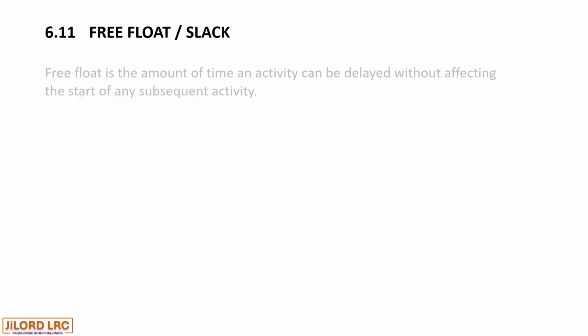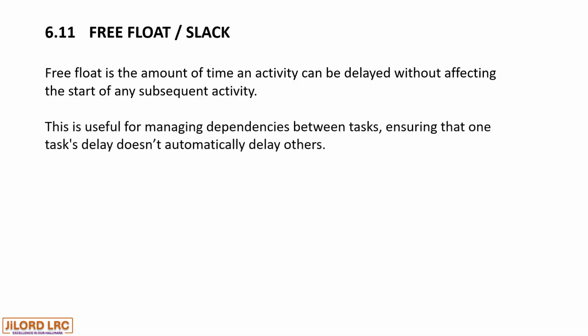Free float or slack. Free float is the amount of time an activity can be delayed without affecting the start of any subsequent activity. So this is activity-centered and not project-centered. This is useful for managing dependencies between tasks, ensuring that one task's delay doesn't automatically delay others.